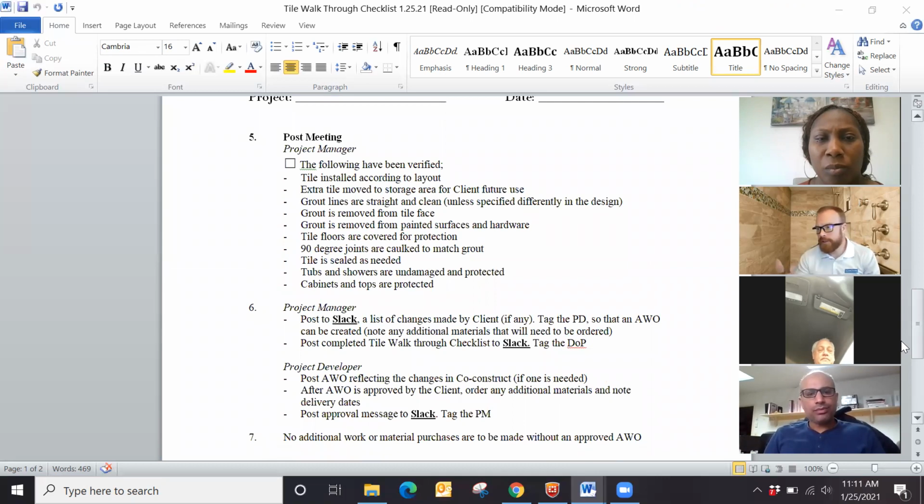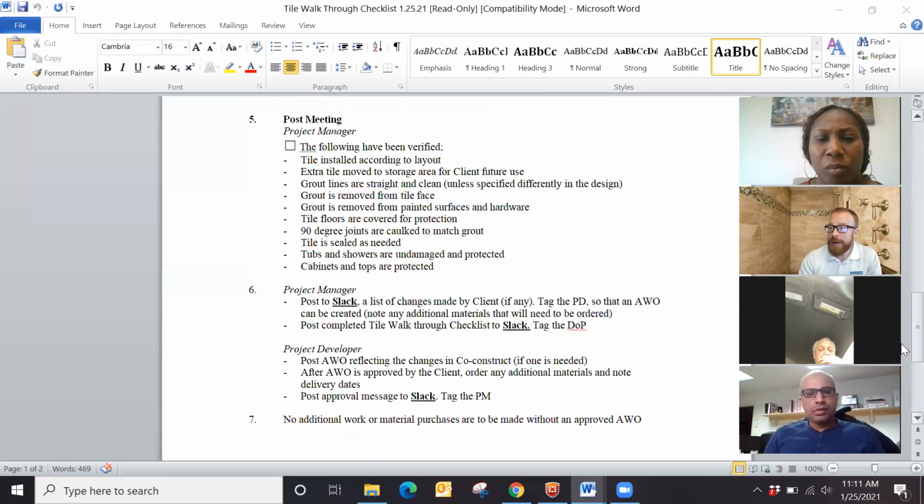This, of course, would be included in backsplashes. Those are a little bit more simple and straightforward. This checklist could, if it's a simple, just subway backsplash across there, just be done with the tile installer. The client needs to be there as soon as it's something specialty, because there's always inevitably, do you want it this way or that way? And the client would make that determination.